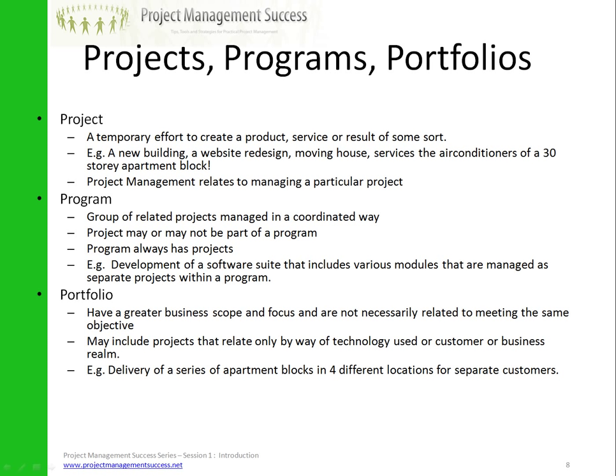And you'll have someone managing a portfolio of projects, and those projects aren't necessarily directly related to each other, but have some sort of association by some other format. So for example, if you're delivering a series of apartment blocks in 4 different locations for 4 separate customers, you may have one person who's managing that portfolio of projects, but they're not part of the same program. They're a different set of projects altogether. Then that could be a portfolio.